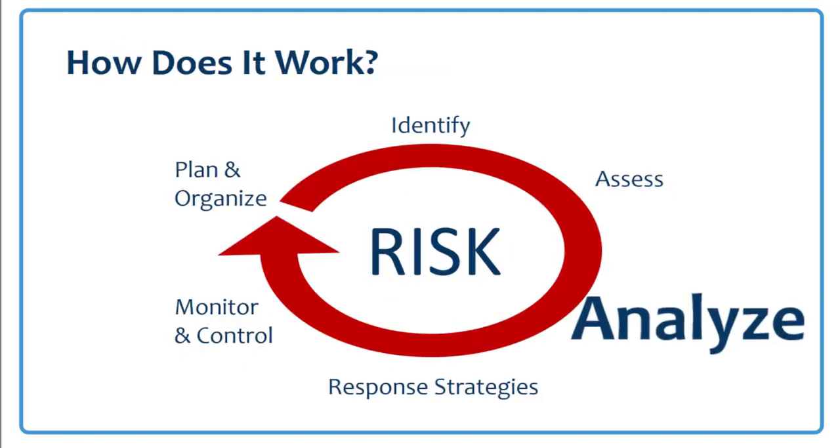Okay, so now that we've assessed the probability and impact of each risk, it's time to conduct the analysis. The type of project you have will dictate the type of analysis needed, and it will either be a qualitative or quantitative analysis. We'll discuss this a little bit more in the presentation, but basically a qualitative analysis is a more basic analysis, and it ranks the order of the risks, from the highest impact to the lowest impact risks.